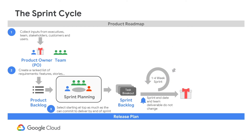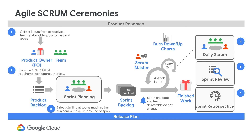Step three is where most of the recurring action process happens. The API team will select the most important user stories to work on for the coming sprint. The user stories have to be fully fleshed out with business, technical, and testing details. The API team will review each user story, break down the activities and tasks needed to build it, estimate the effort, and commit to a set of user stories for the next sprint. Each sprint can be one to four weeks in length, but teams often settle on two weeks as the happy medium. At the end of the sprint, the user story should be completed and ready for go-live. Throughout the sprint cycle, the Scrum Master coaches the team and tracks productivity through burndown and burn-up charts to measure velocity.